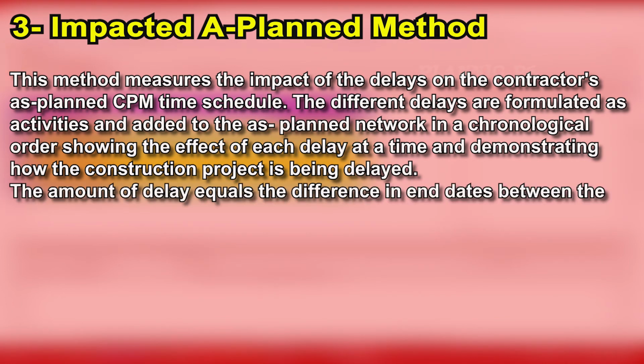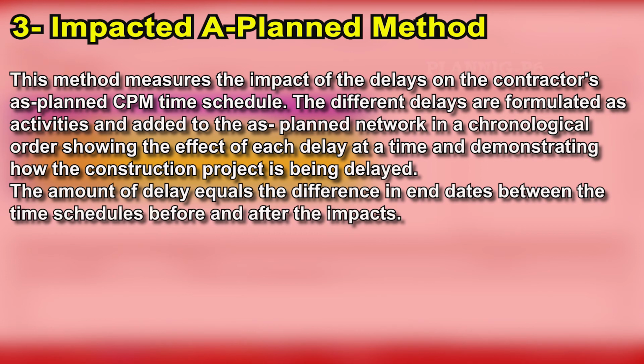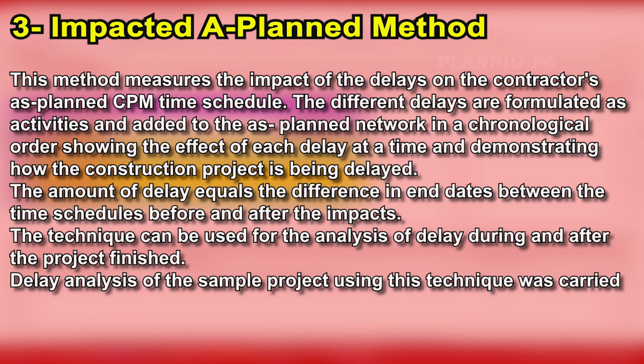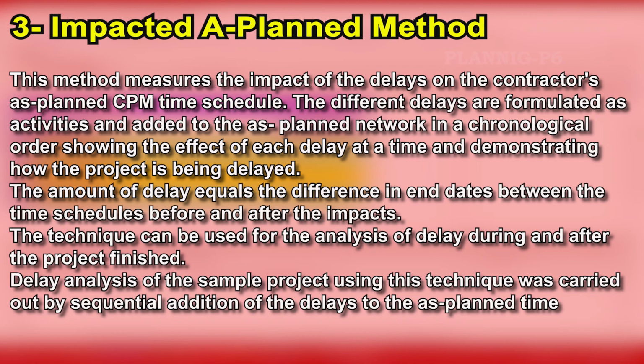The amount of delay equals the difference in end dates between the time schedules before and after the impacts. The technique can be used for the analysis of delay during and after the project finish. Delay analysis of the sample project using this technique was carried out by the sequential addition of the delays to the as planned time schedule.